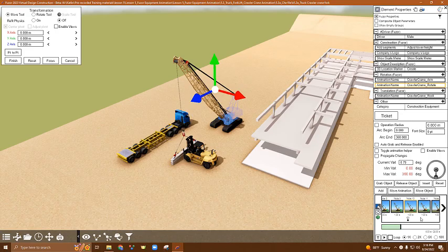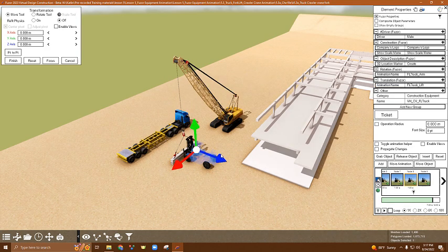Now there is one other timing issue that we need to address. This has to do with the overall length of each animation. In this scenario, we will put all the animations into the same equipment task. This means our 3 animations, although they are currently different lengths of time, will adapt to fill the set duration of the task. The easiest way to adjust for this is by making each animation the same length of time. So our longest animation is our crane animation, which is 28 seconds long. Our forklift is only 8 seconds.